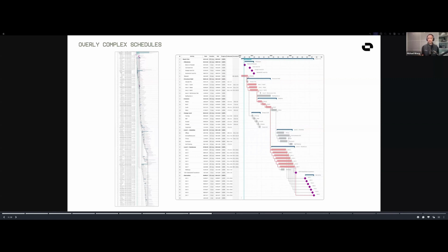And they're so much more set up for success on their projects because they've taken the time to really understand what is this thing we're driving to? What's the execution point? All right, let's take that piece of the schedule. Let's take that phase that we validated in maybe that full template that we had, that 1,500 line item schedule, and let's inject that and give that to the team that's actually going to be building it and have them fill in the detail, have them commit to that detail and commit to their work.